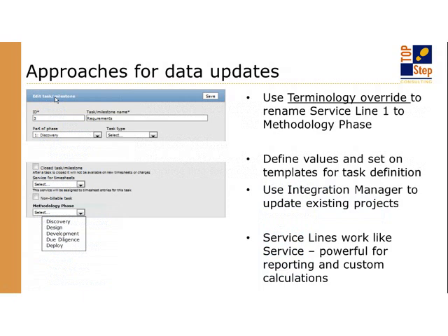And now you have the ability to pull those actuals versus estimates, saying, okay, in general, and even thinking project by project, how long are we spending on design versus estimate versus actual? How long are we spending on projects of this size? How long are we spending on projects in this line of business? Just going through and finding out where there are trends that you could make some investment and improve on your services project methodology.